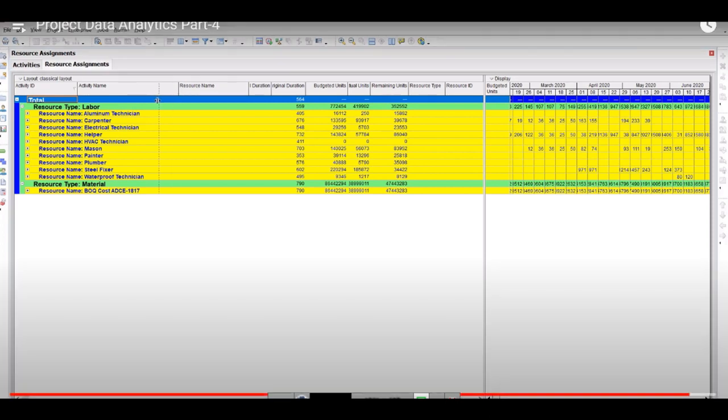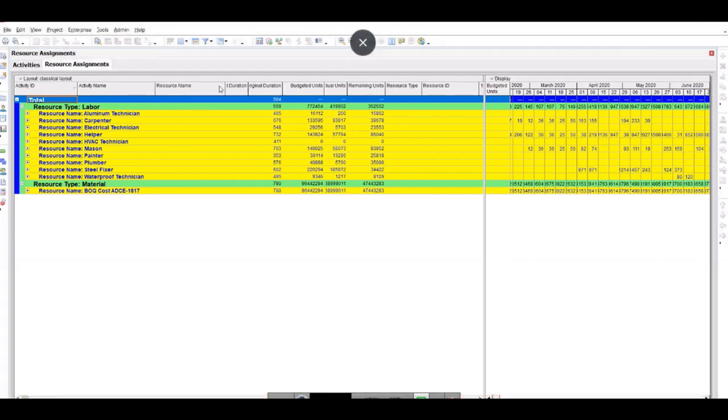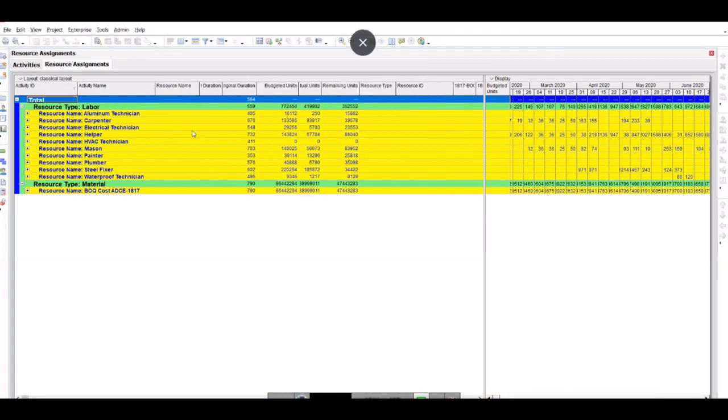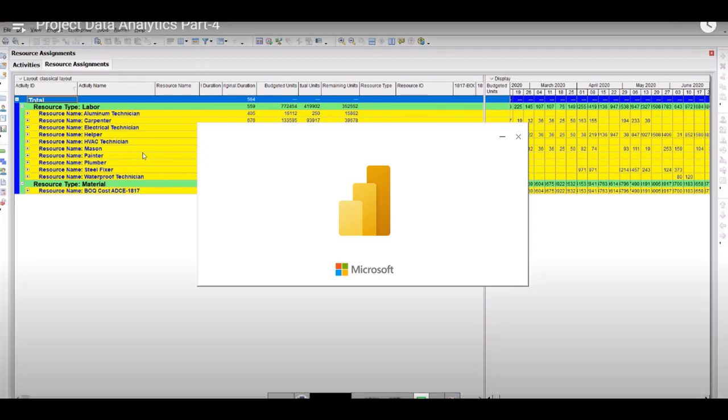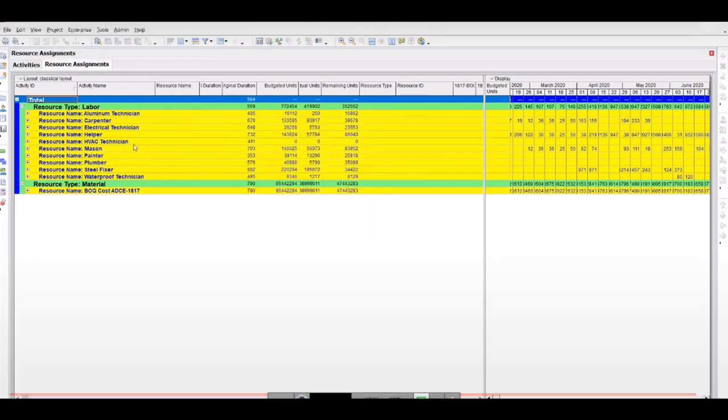And why can we not do earned value there? Because earned value is always done with the baseline data. We discussed in session 2 that the baseline units and baseline dates are used to compare with the budgeted values or the planned values and earned values, in order to check whether we are going good or bad. If baseline values are not available in resource assignment, there is no point in doing earned value with budgeted units, because budgeted units do not have a fixed start and finish point.